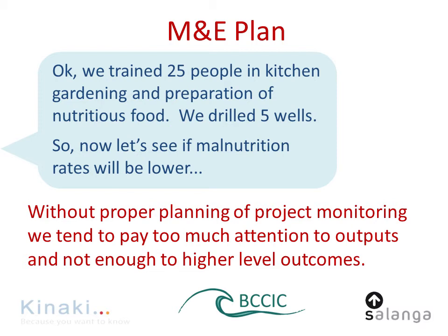What is the purpose of the collection of that specific information? Is it only for linking to the report, or is it also influencing the implementation? Are we actually expecting that the change will be happening already during the project period? We should also try to place the frequency and in fact the usage where this number will be linked to. So which reports or which tool we want to use these results in.